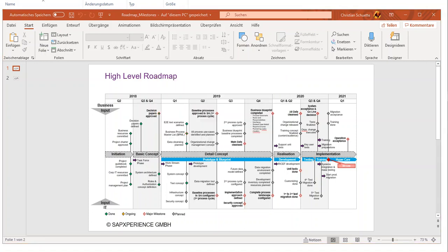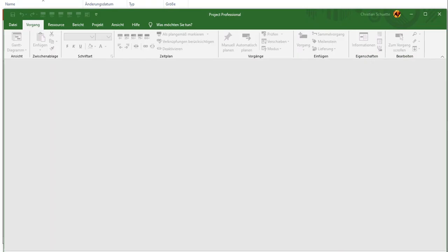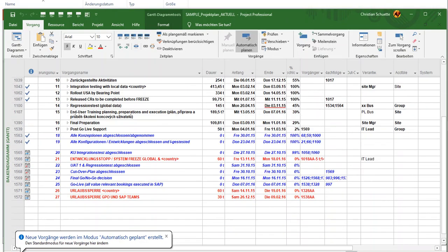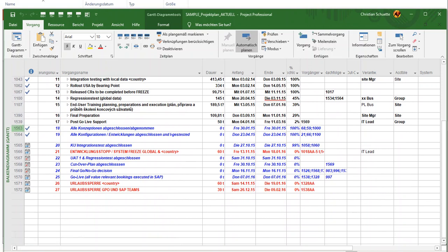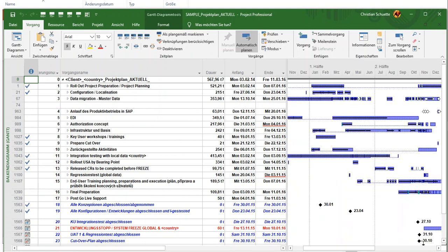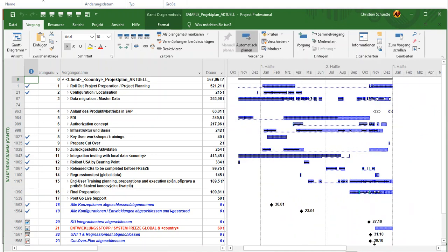What I can also show you, what I always did in my projects, is that I always put the major milestones at the end, as well as the major phases, so that I am able to simply take a certain view out of here and present this to the steering committee, also like a milestone planning straight out of MS Project.